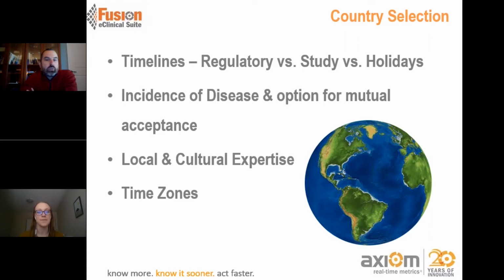And when you're thinking about regions, think not just of countries, but also of mutual collaborative regions. Some countries are now collaborating with their regulatory agencies so that one submission in one area can count for multiple regions. It's very important to know which of those countries are combined with others.